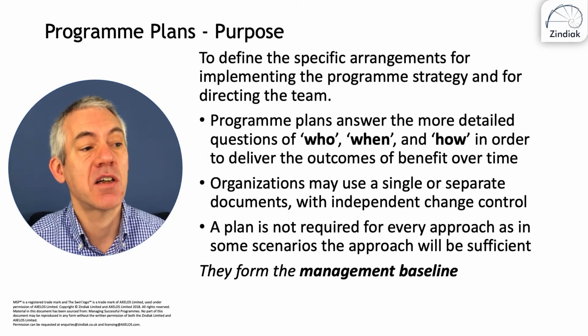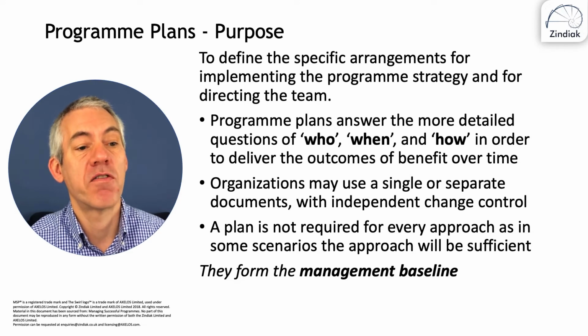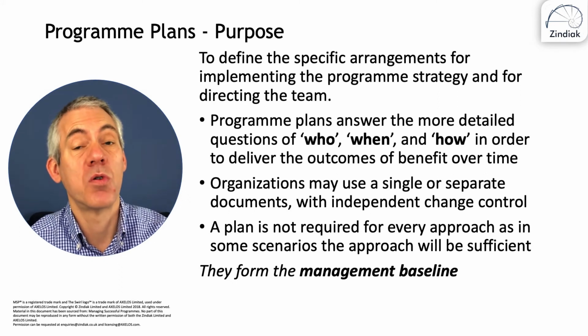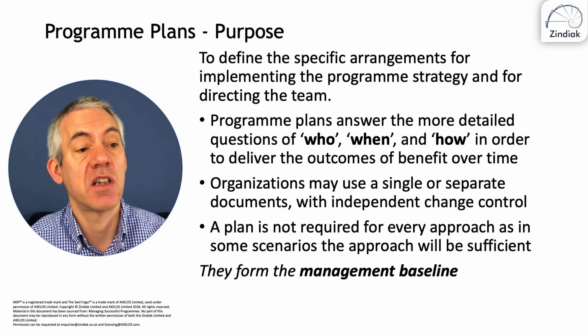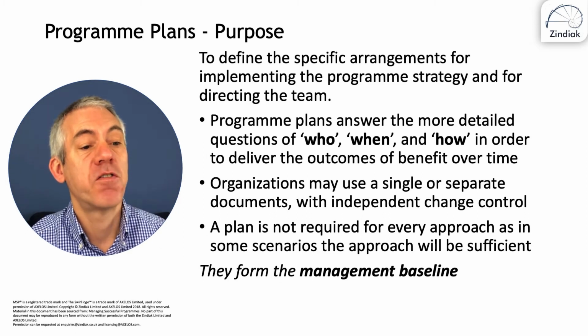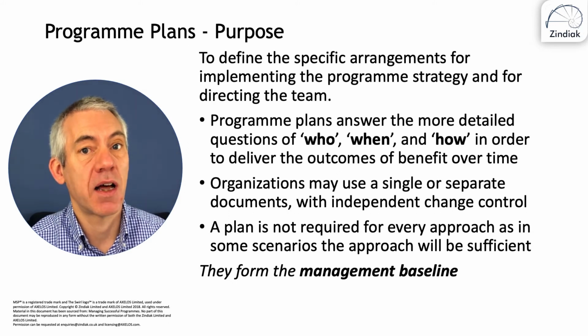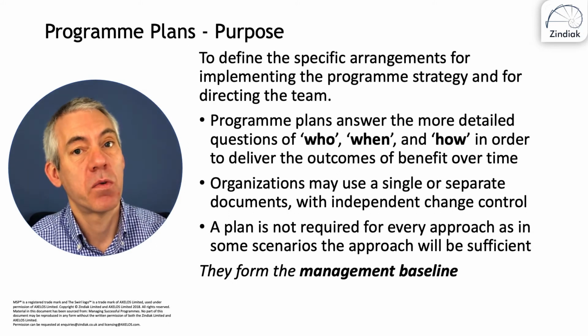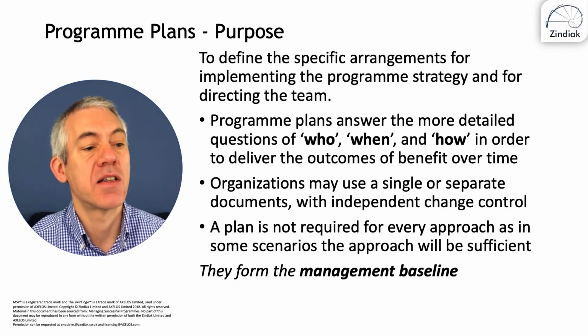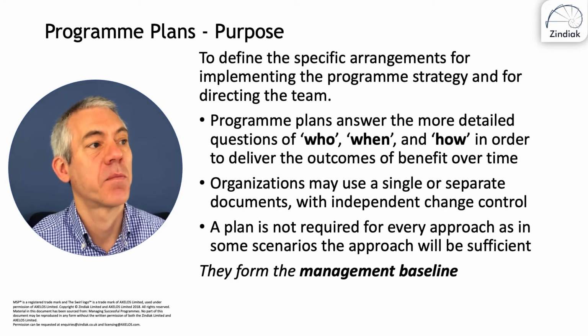Organizations may use a single or separate documents with independent change control. A plan is not required for every approach, as in some scenarios the approach will be sufficient. And that's an important point to remember for the exam as well. You don't need a plan for every approach. They form the management baseline. So we've got the governance baseline, which is the programme strategy, and the programme plans are the management baseline.